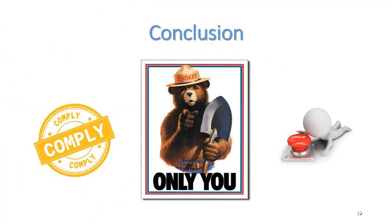In conclusion, in order for a project to be considered capital, it must have a useful life of 2 or more years and cost $5,000 or more per unit or set. Projects can either be equipment, software, or construction, with construction having the longest and most complex approval timeline. Capital funds are primarily borrowed and as a result must comply with more rules and regulations than operating funds. We ask for your help in complying with these rules and with meeting spending deadlines, and ask for your understanding that project approval can take a long time.